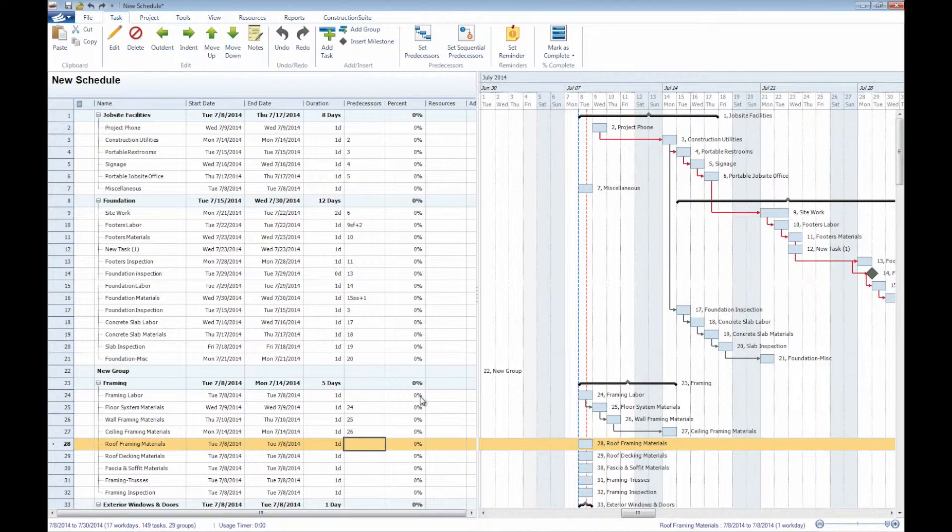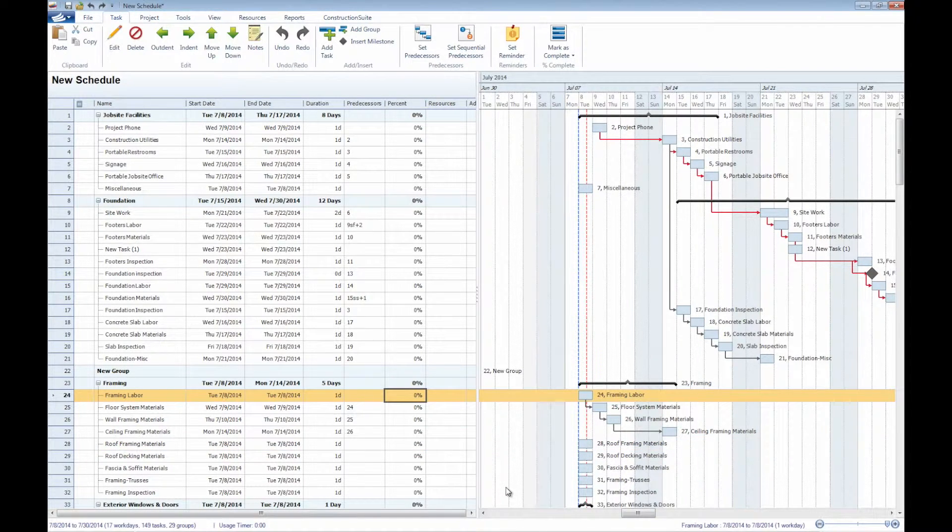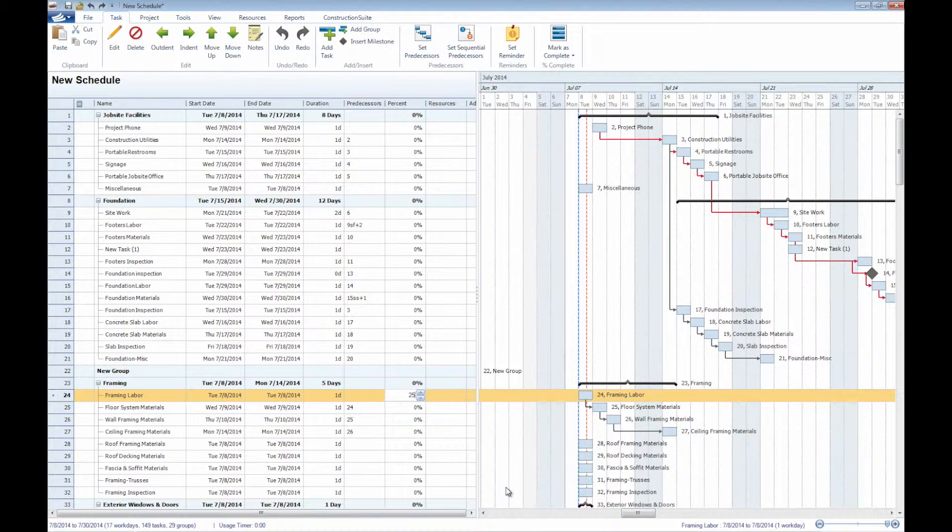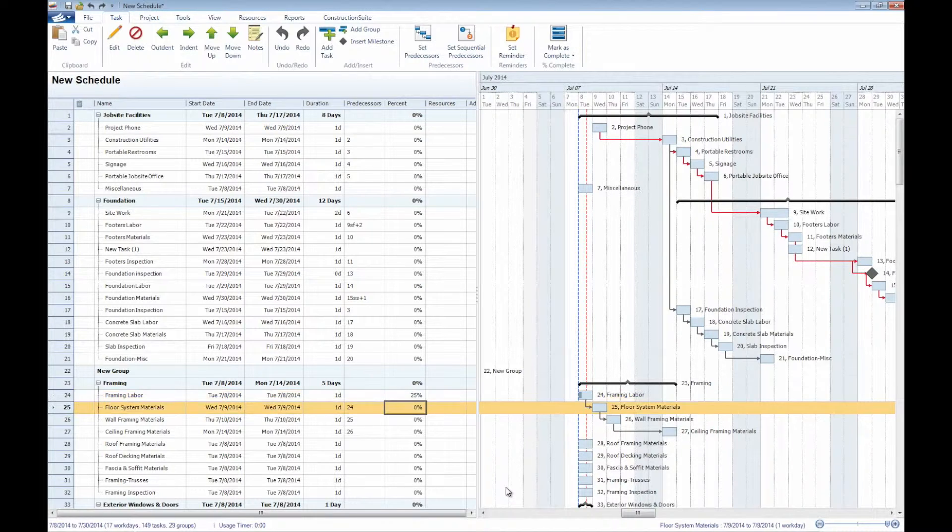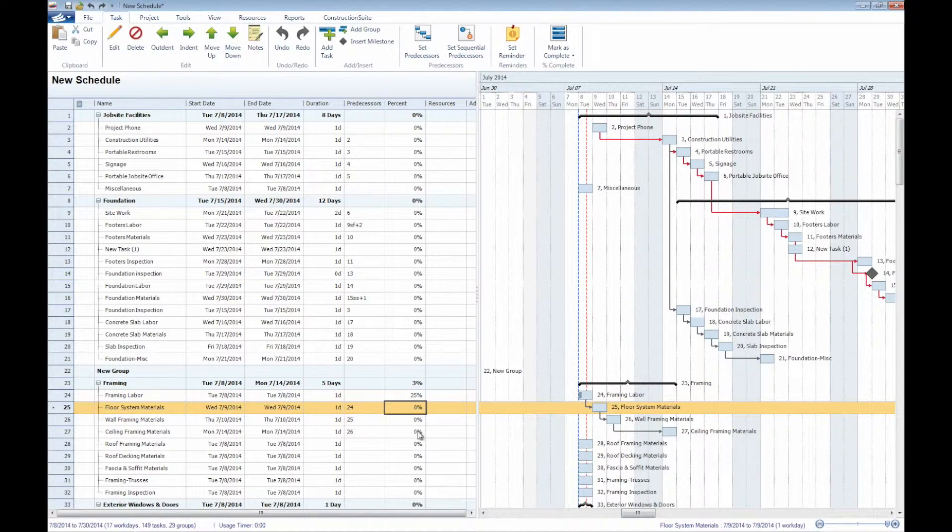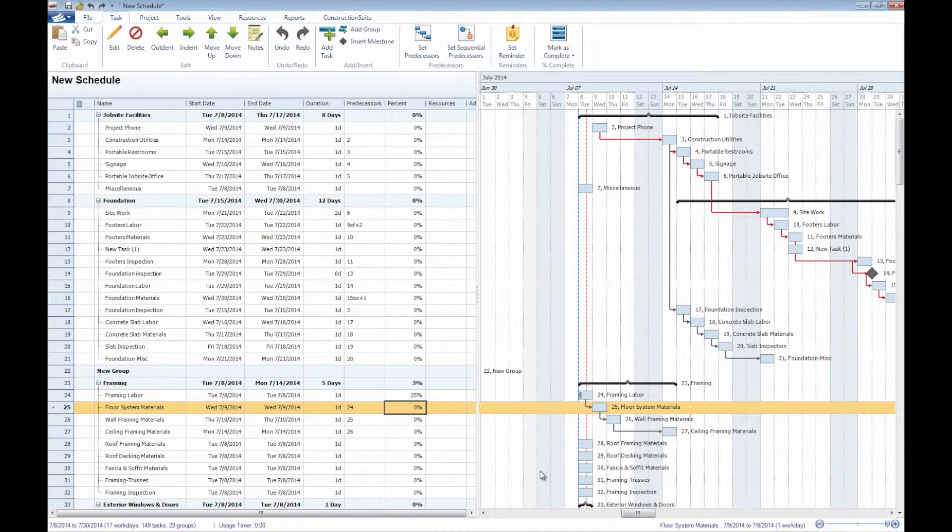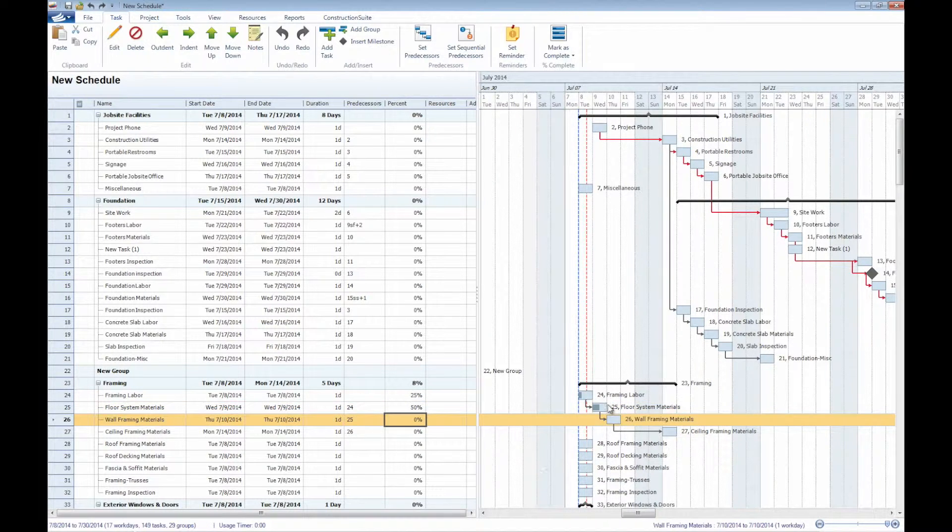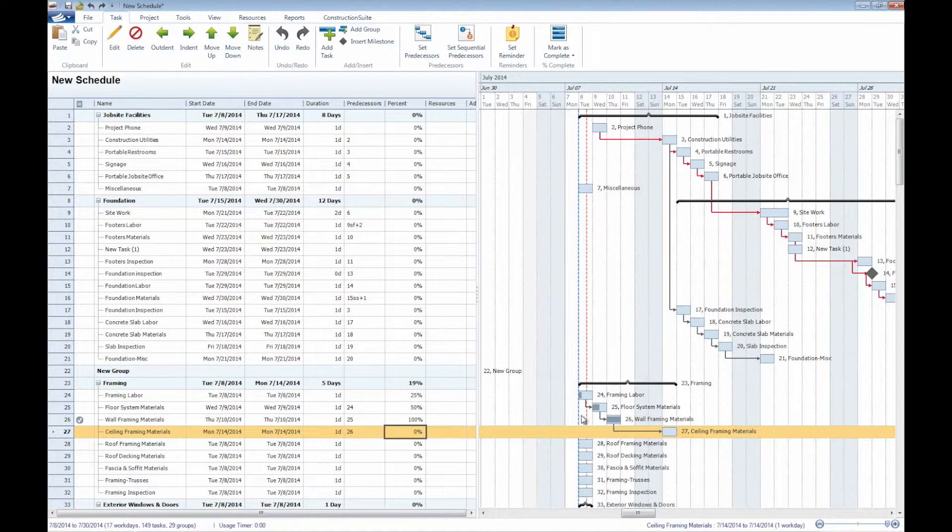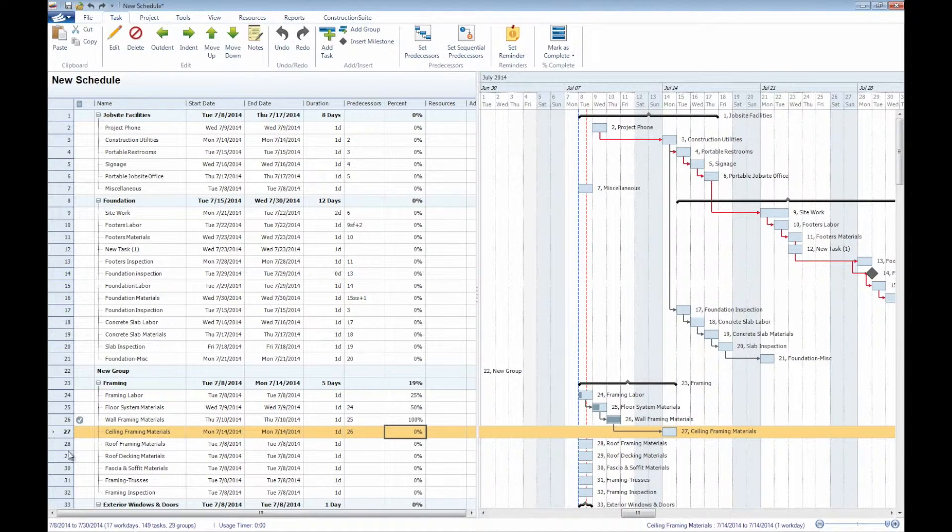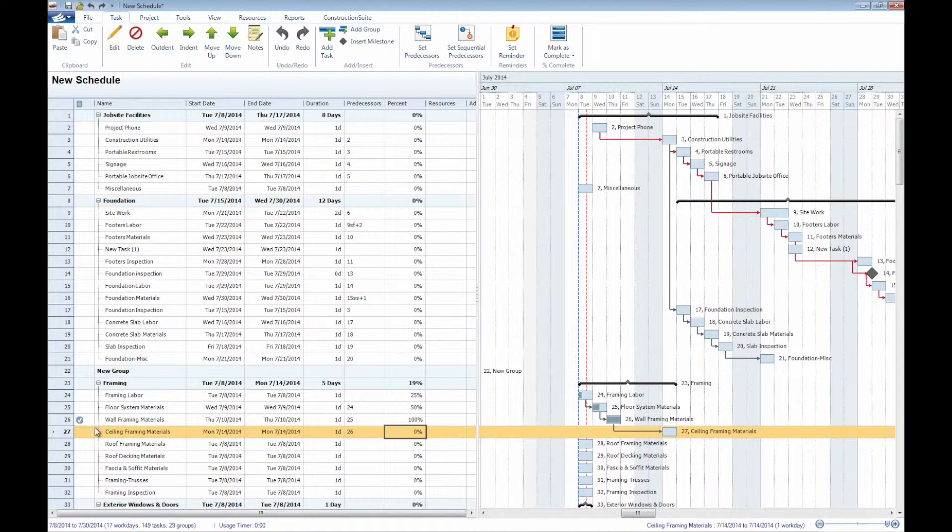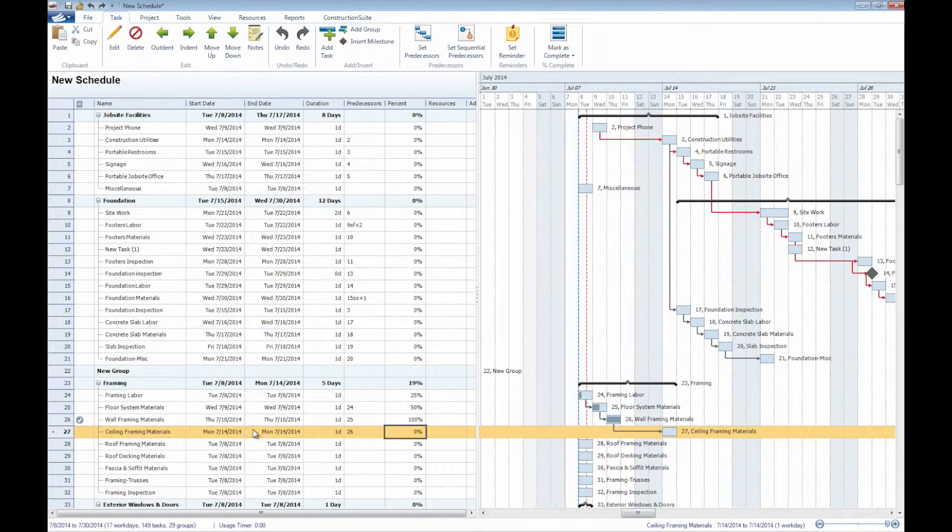We can also update our percentage complete. Whenever we enter any sort of percentage directly into the task, here in the task list, we'll notice that that shades in the color of this individual task here. Say if we wanted this to be 50%, we'll notice that half of that bar has been shaded, whereas 100% is going to shade in that entire task. We'll also notice that once 100% has been reached, we are noted that the task has been completed here, and we can move on to the next task.